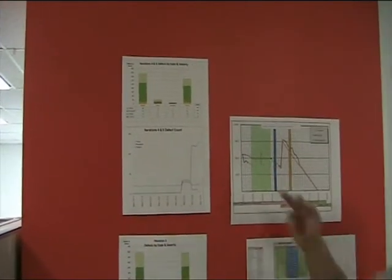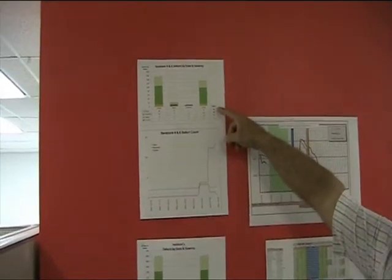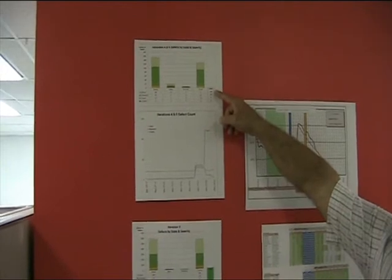Because these 2 iterations, 4 and 6, are combined, they're showing us one chart. We're looking at the defects and the state of severity by those defects. So how many defects do we have outstanding? How many have been resolved but untested? And how many have been closed?